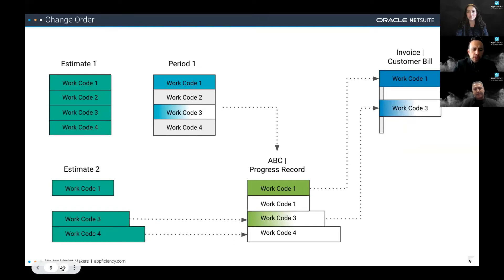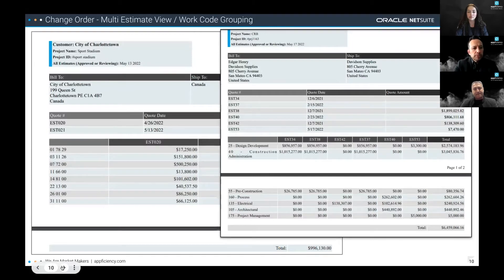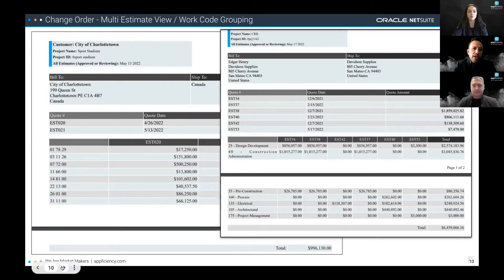For those not familiar with how work codes interact with change orders: a change order feeds into the mini-project estimate and then flows into the general overall progress to the billing record, and ultimately to customer billing. Having a platform that can present the information in multiple ways — by cost codes or work codes, at divisional code level, in landscape or portrait orientation — depending on how many change orders you expect to deal with on each project — provides a very valuable foundation.